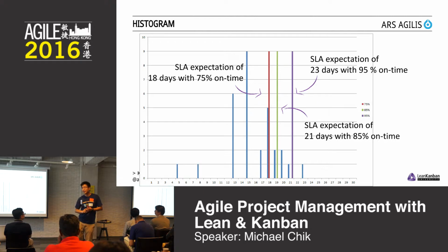After Christmas, delivery of this Christmas feature really doesn't make any sense. So you want to be dead on sure that you deliver this feature for Christmas. You go to a higher percentile. Then you just work backwards and find out when you have to start work on that. And you're statistically 95% guaranteed that you will make it on time.